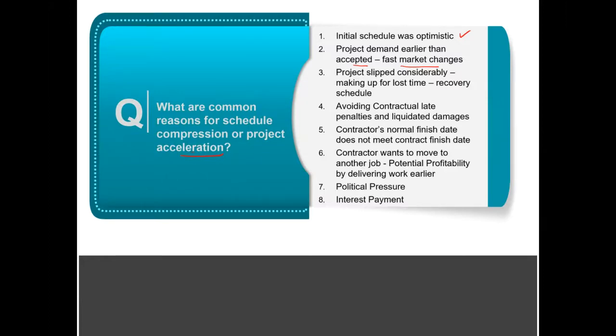And it could be this: the project has slipped considerably, and you need a recovery schedule to make up for the lost time. Or you want to avoid the contractual late penalties and liquidated damages which result from project delays. Or the contractor's normal finish date does not meet the contract finish date.